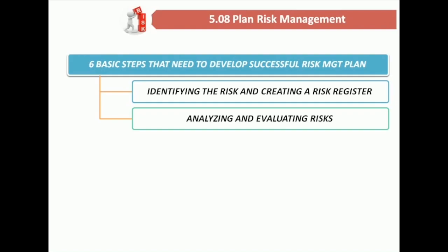Project managers are urged to rate each risk listed in the risk register on the scale of low, moderate, and high likely occurrence rate, and low, moderate, and high seriousness of the rate of impact.